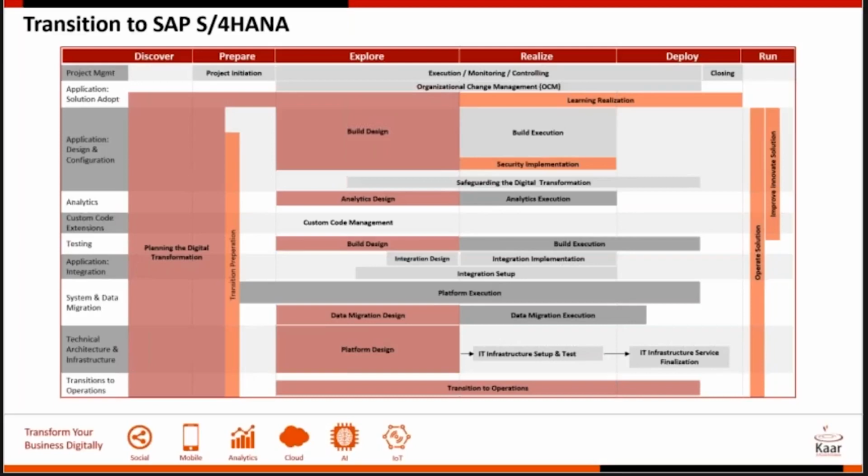From our most recent experience, we suggest that you run extensive performance tests on the production hardware with full load, including the final hardware setup. Like in your final production system, you would have replication. And once you go live, you would have a lot of data that has to sync up with the other reporting systems. So unless you run an end-to-end test of your business transactions with all the right kind of scenarios, you would be caught unaware of the performance bottlenecks that you might face.